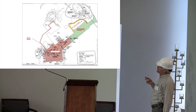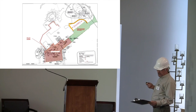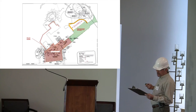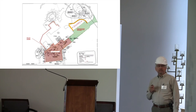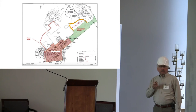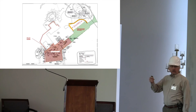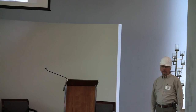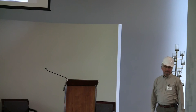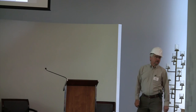So I mentioned obviously Sundays in the Rose Lot. This will be available Sundays as well. The pond I mentioned, keep the BUC website in mind to watch. I mentioned the refresh work. So the social hall, the classrooms, the pavilion, we're hoping by September 1st, right? The rest of it, the major part, the foyer, gallery, and the commons connector, is into the fall. So we're talking October-ish in terms of getting some of the finishes done. That's kind of a loose target, but there'll be some impact still when we get back in September, okay? So we'll just keep you posted as often as we know something, and watch the website.